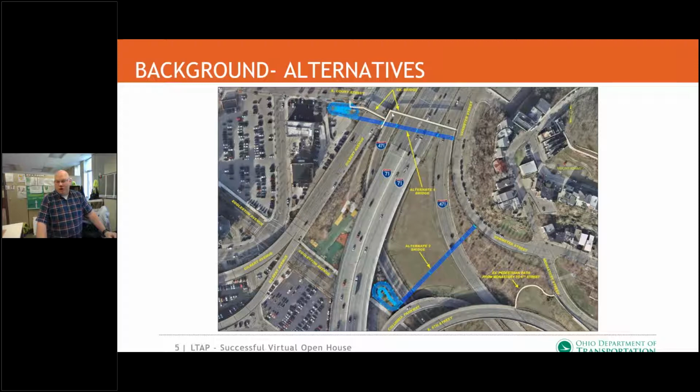So we have this existing pedestrian bridge. It's actually two bridges that are connected, and due to the ADA compliance issues with the bridge, we can't rehab them, we have to replace them. So we wanted to present the public with two alternatives. One is where the existing bridge is replaced with another one that's very close by to it, so they have the same start and end points. And then an alternative that was located just to the south, which drops them off on another street, which is very, very close by to the original one. And then, of course, all projects have to have a no build. Our no build had a removing of the pedestrian bridge and using the existing sidewalk that was further south.